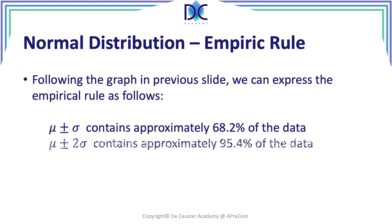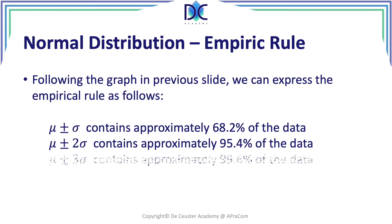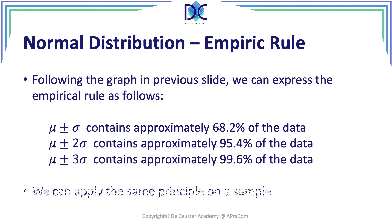When we look at two sigma, we find 95.4 percent of the data, and mu plus or minus three sigma we find approximately 99.6 percent of the data. This is also called the empiric rule and we can apply it on a population or on a sample. You can use this distribution to calculate the probability that the project will be finished in less than a certain time, more than a certain time, or between two times.